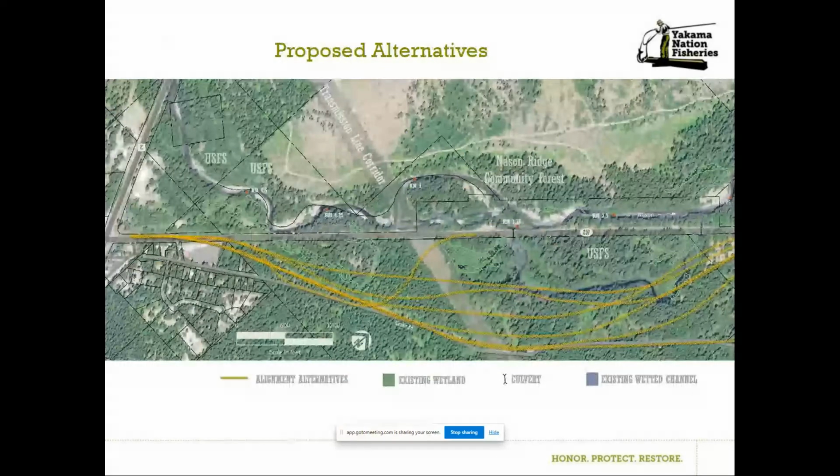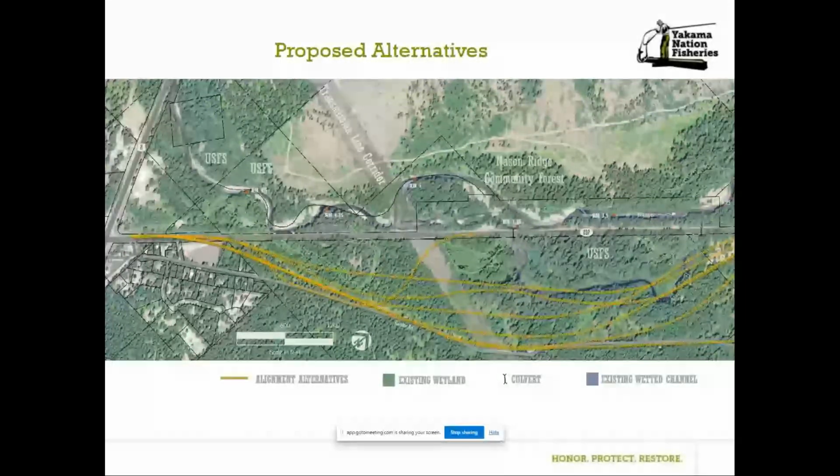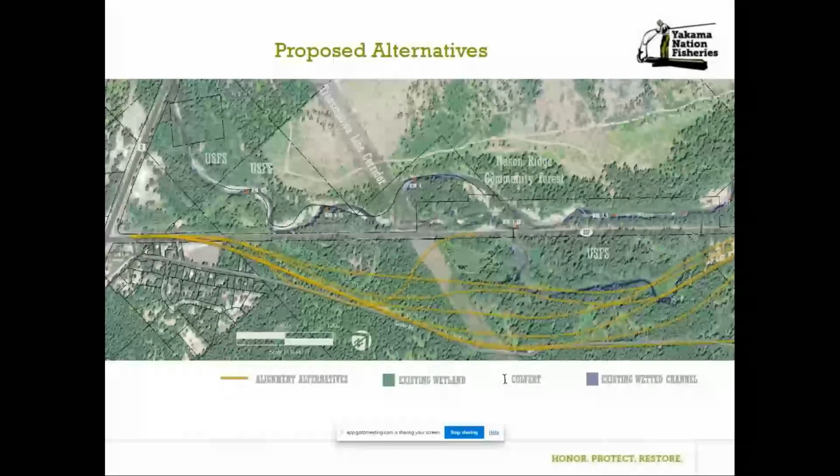For review, the photo provides an example that incorporates the Yakima Nation road alignment with the previous 6 alignments from 2011. In this case, alternatives 1 through 7 move the road away from Nason Creek. Within the body of the document, each alignment is discussed in detail. For example, impacts such as fill or having to mitigate for avalanches are discussed. The benefit of each alignment is removing the road out of the floodplain and avoiding wetlands, and so on.